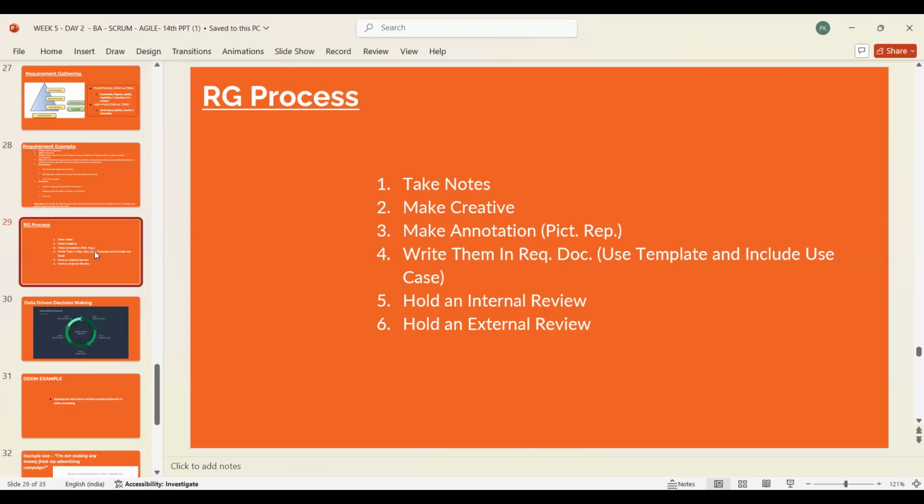Now, template means what? I call it a skeleton, which will be available. You just have to put in the information. For example, there is an objective tab and the page might be blank, so you have to mention the objective of the project. Then the members of the team: there will be only a table, or maybe their roles, like product owner, delivery manager, team scrum master. Only these titles will be there, so you have to mention names against them. Then the overview of the project, the purpose of the project, and the project in detail. All this guidance, those templates, are generally available.